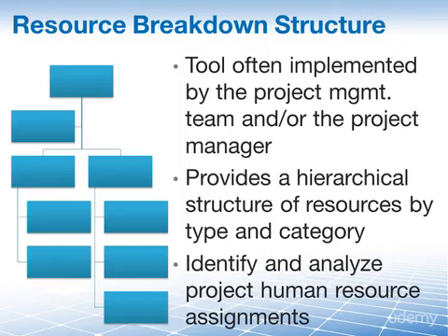In essence, when you look at your company, you will see that in every one of those boxes in your organizational chart, there is usually a name. Now, let's group these names together. Everybody who's in marketing team, well, let's group the 5 people who are marketing associates as marketing associates and take 5 boxes and put it back together as one. So instead of having individual names, we have categories of resources that we include in the RBS.